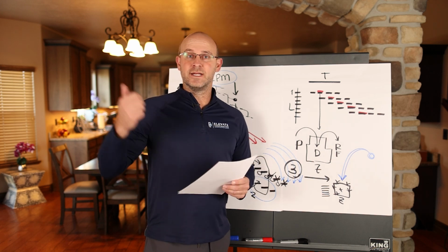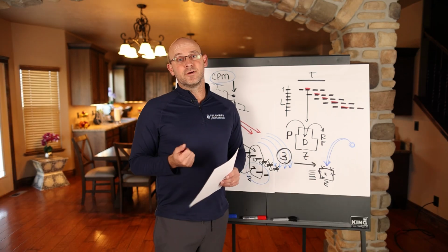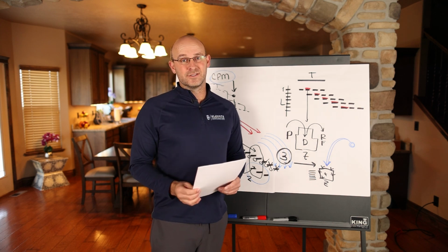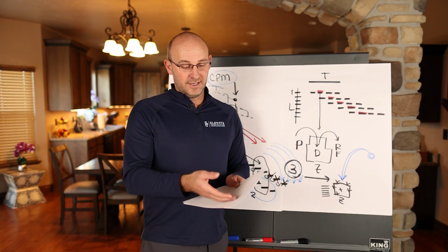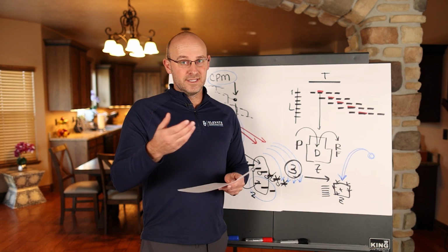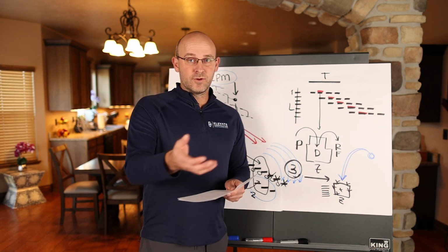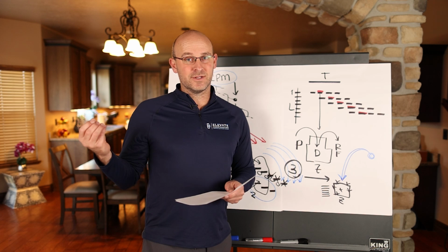It's making work ready. It's not my labor that's the problem. Then the general contractor says, I'm going to tell the building owner and the client that you're giving us a hard time. Your response could be like, hey, I have this documented every week. This is what we've been asking for every single week to get work ready out ahead. It is not my labor that's the problem, right?